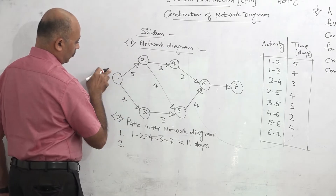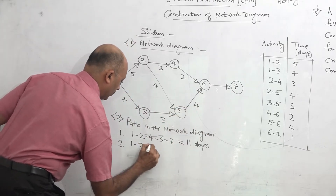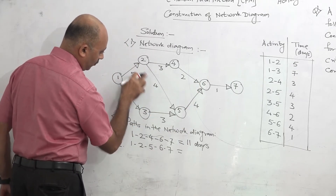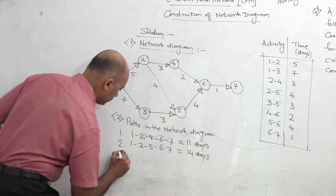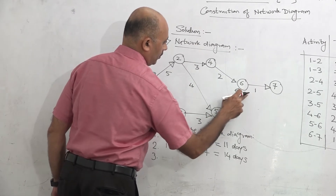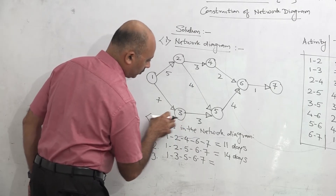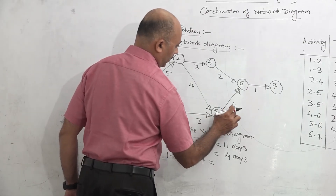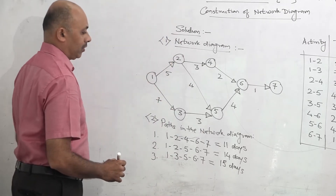The second path is 1-2-5-6-7: time is 5 plus 4 is 9, plus 4 is 13, plus 1 is 14 — so 14 days. The third path is 1-3-5-6-7: time is 7 plus 3 is 10, plus 4 is 14, plus 1 is 15 — so 15 days. We have 3 paths: 11 days, 14 days, and 15 days. Now out of these we will select the longest path.